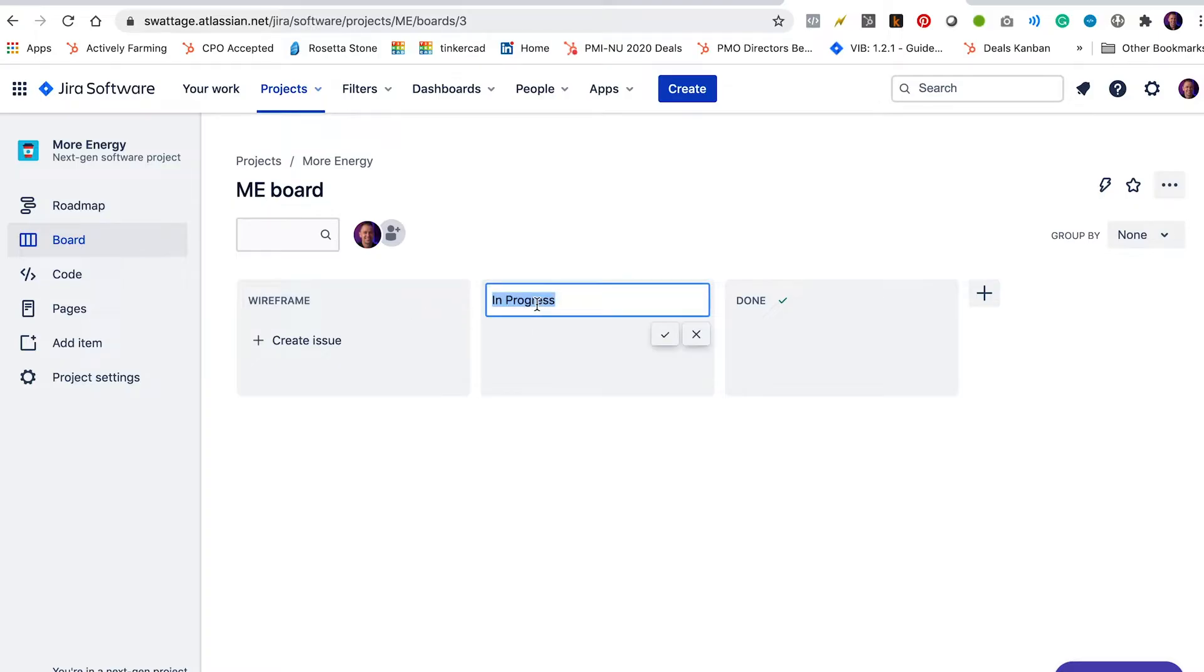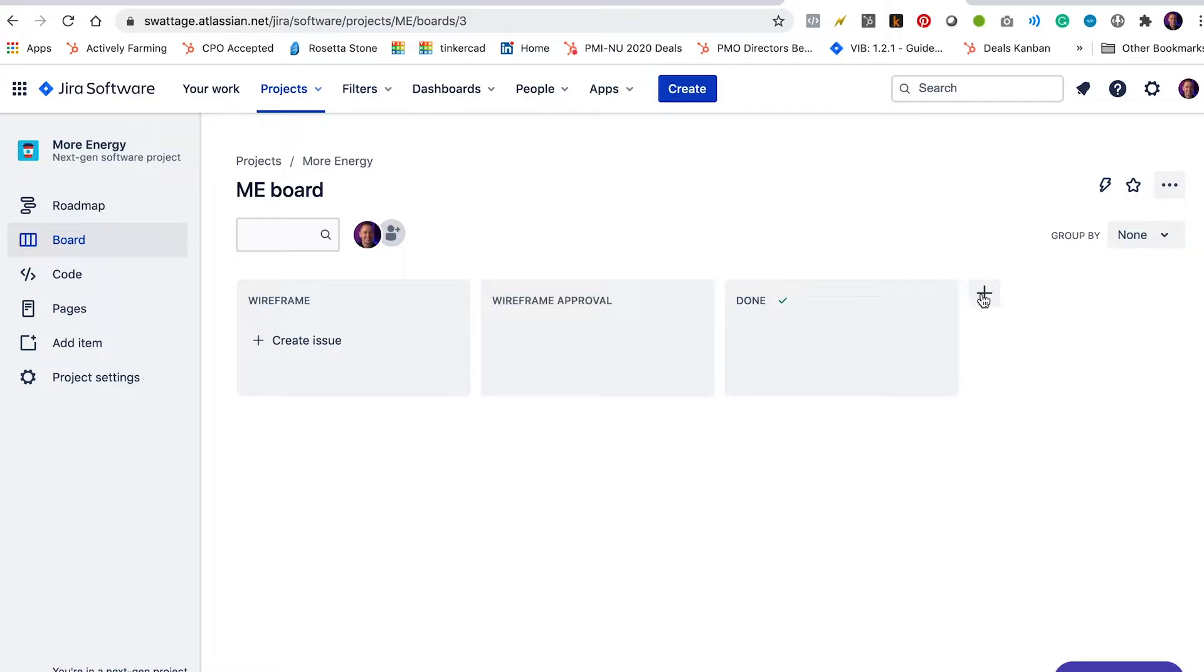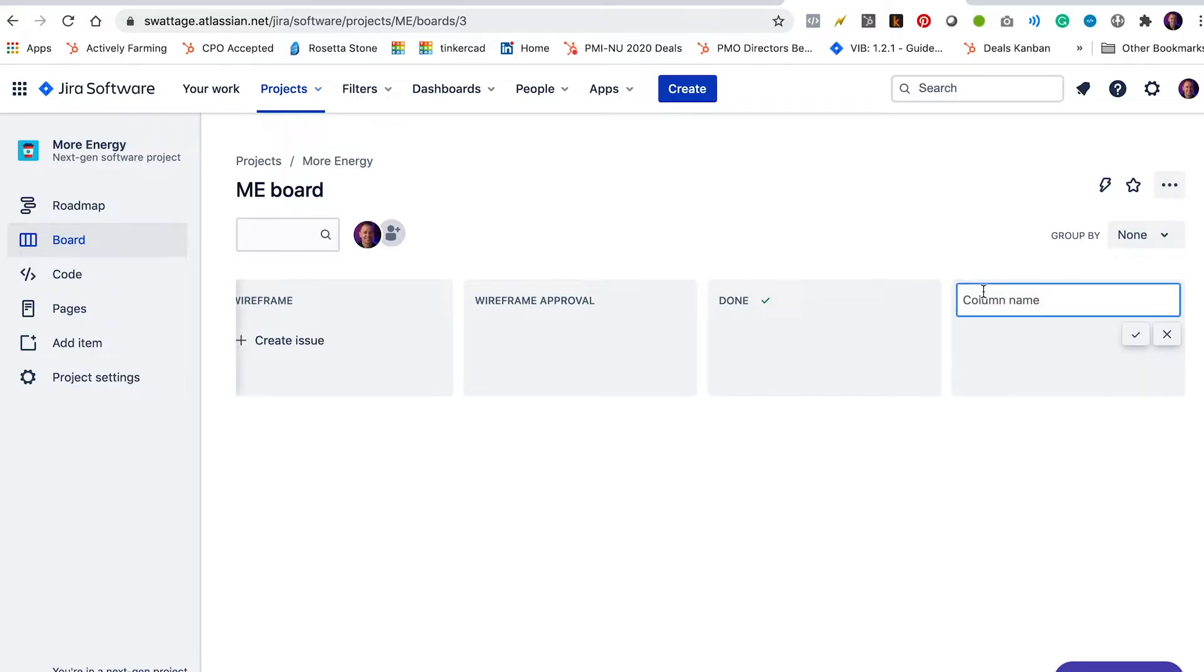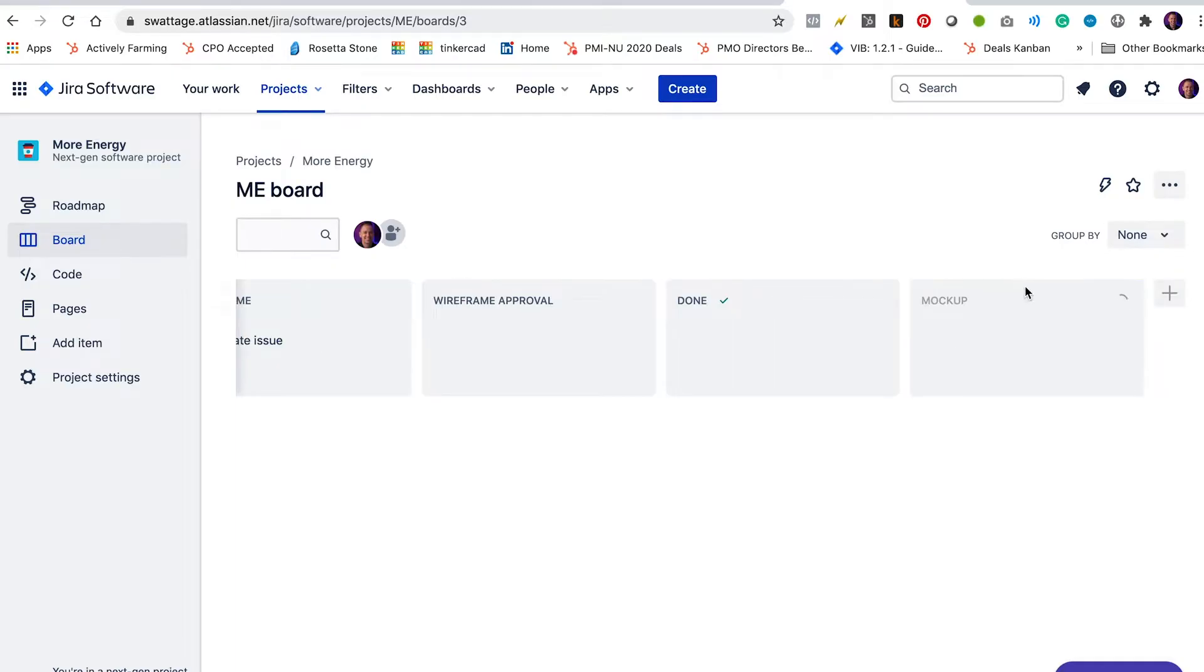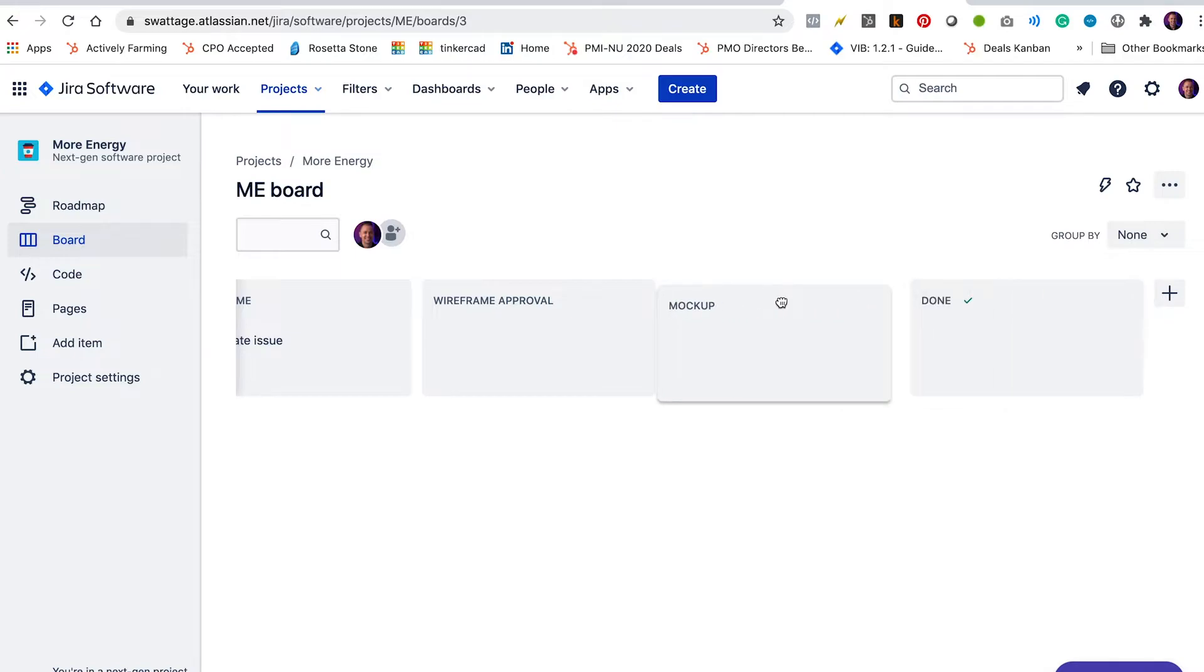We're going to change the next column to wireframe approval. That will be for all the user stories who have wireframes but need to be reviewed by the client. We're going to click this plus sign over here to add a new column. We're going to change this to mock-up. And we're going to click and drag this list to be the third list on the board.